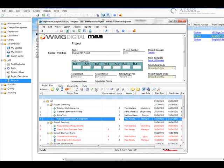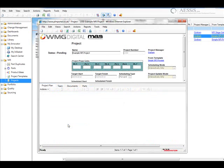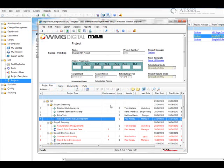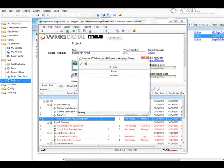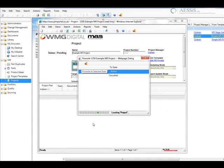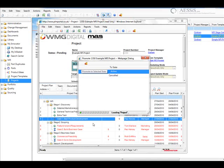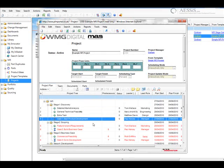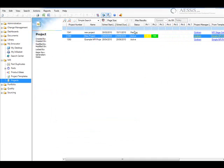So having now created the project, the next thing we need to do is make it active and release it to the organization. What this is going to do is push the tasks out to individuals in baskets, which we'll see in a moment.